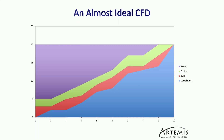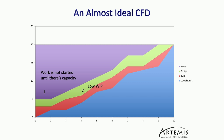Now let's look at what an almost ideal CFD would look like. First, work is not started until there's capacity, so we're going to have a lot of things marked as ready and not started until we have the ability to actually work on them. Number two, we have low WIP — low work in progress. What we want to do is limit the amount of work we are doing at any given time to just a small number of items. Multiple studies have shown over the decades that lower work in progress means higher throughput — more items completed during the course of the sprint. We focus our efforts on completing a few things and then moving on to the next. Low WIP is incredibly important for getting good flow of work through your teams.